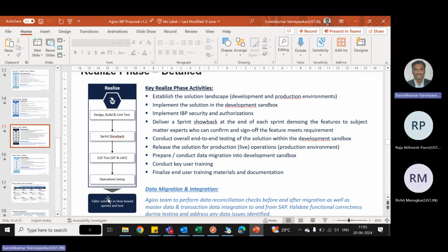The process is the same. What will you do if there is a change? First you get the requirement from the customer. Then you check it and tell them yes, it is possible. Then you create a CR, they approve it, and you implement it in development. You do the basic testing, then ask the user to test as part of UAT. Then you move it to production, wait for 1 week as hypercare, and then hand over the KT to the support team. The same thing, but in a larger manner.